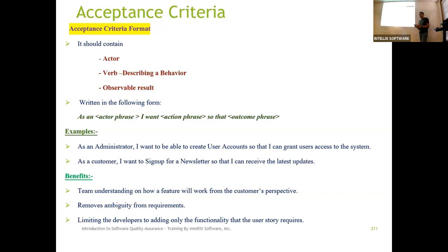You're adding details. So for example, if the story is that the dealer should have a unique franchise number, you're adding the detail of how the franchise number gets added to it, but you're not increasing the scope. It still focuses on the same task. That's story refinement, versus adding brand new stories, which essentially happens sprint over sprint over sprint. So those things are happening in parallel. The product owner slash BA who is working with the business keeps getting more feature requirements from the business.